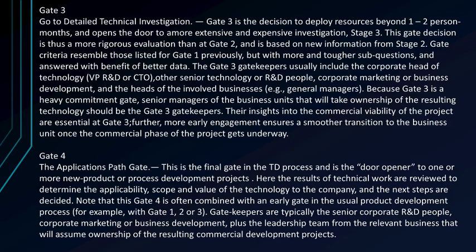Sound project management methods are employed during this lengthy stage, including periodic milestone checks and project reviews. If the TD project veers significantly off course or encounters serious barriers to completion during Stage 3, the project is red flagged and cycled back to Gate 3 for another go-kill decision.